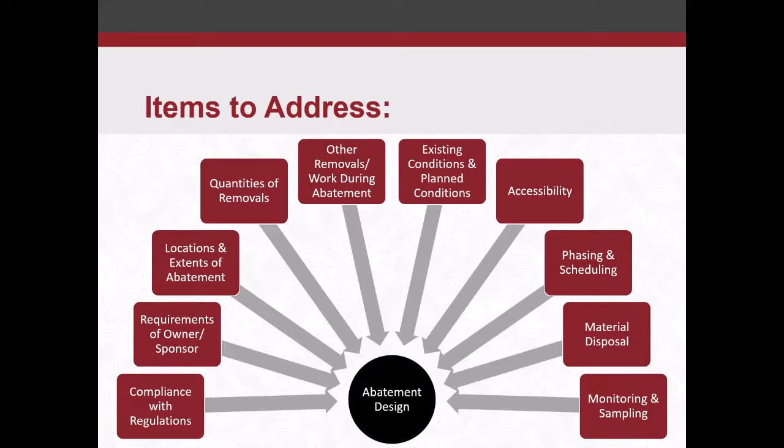And then there are items where, if you have mixed asbestos and PCB, certain facilities aren't going to accept it that way, so you've got to look into where those have to go for disposal. And then finally, monitoring and sampling.